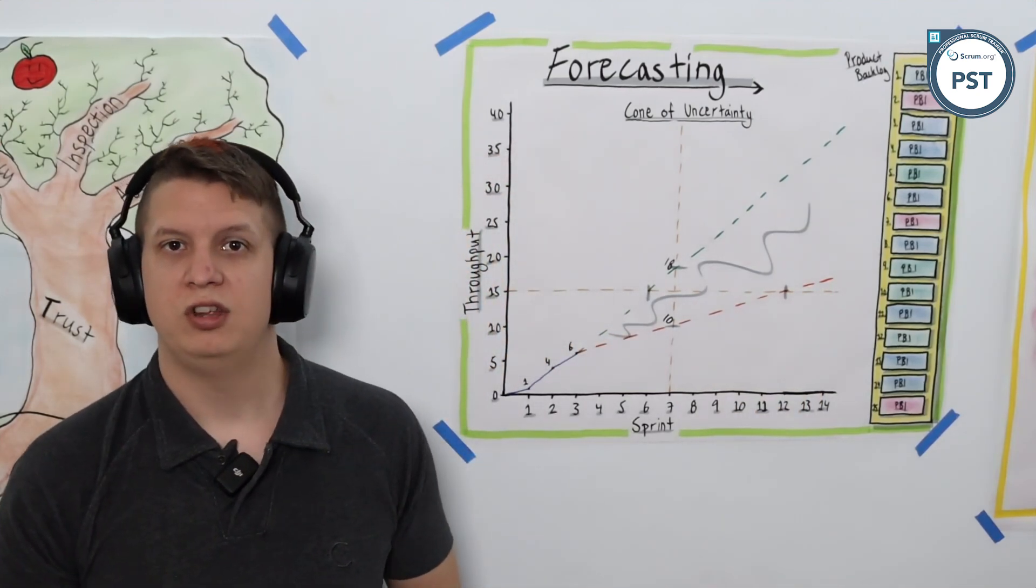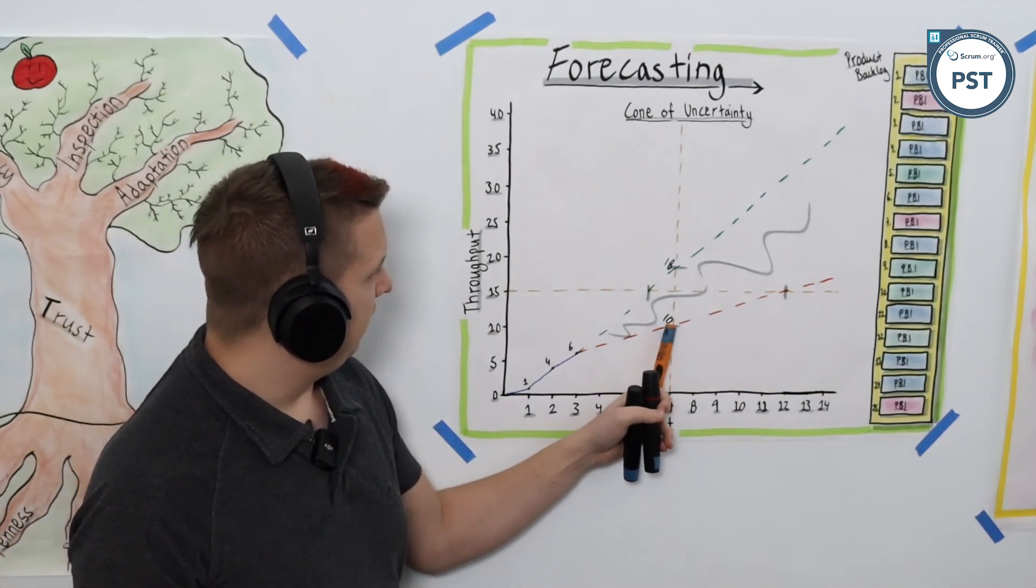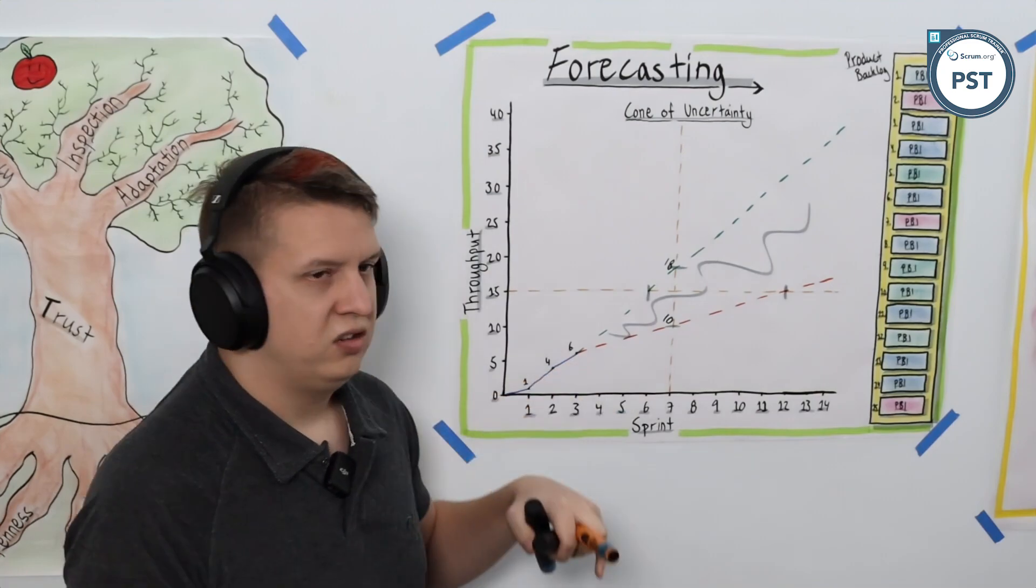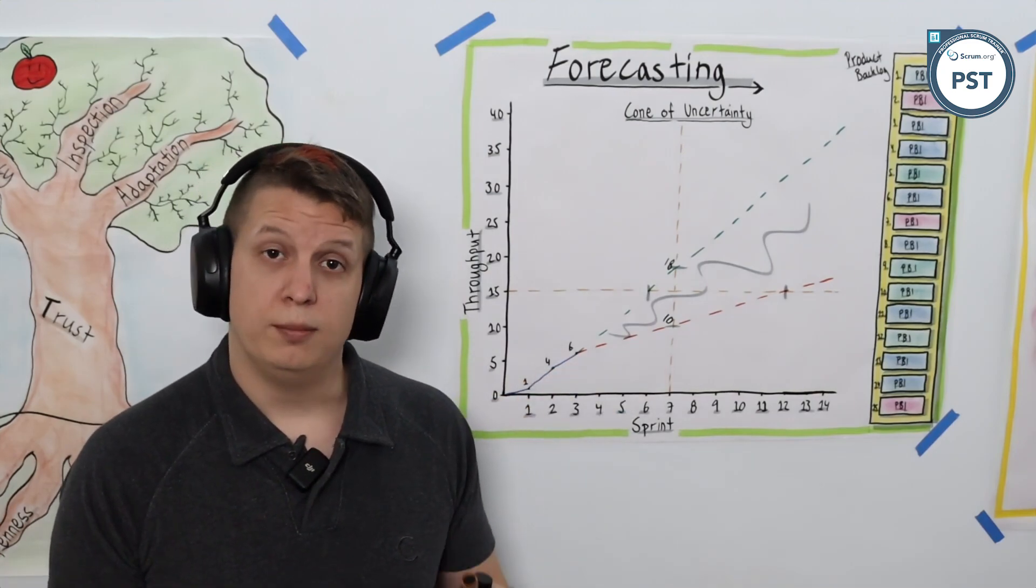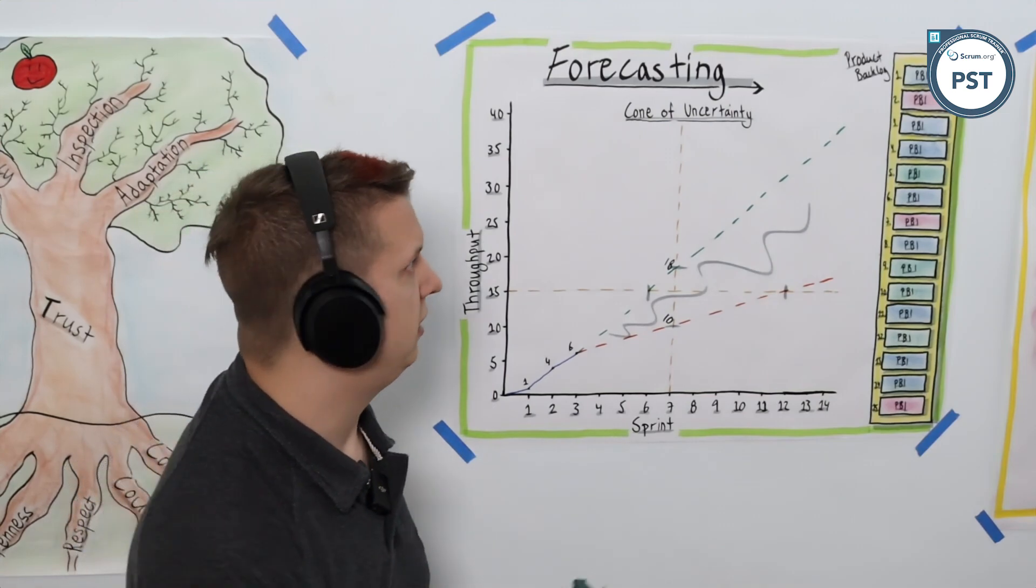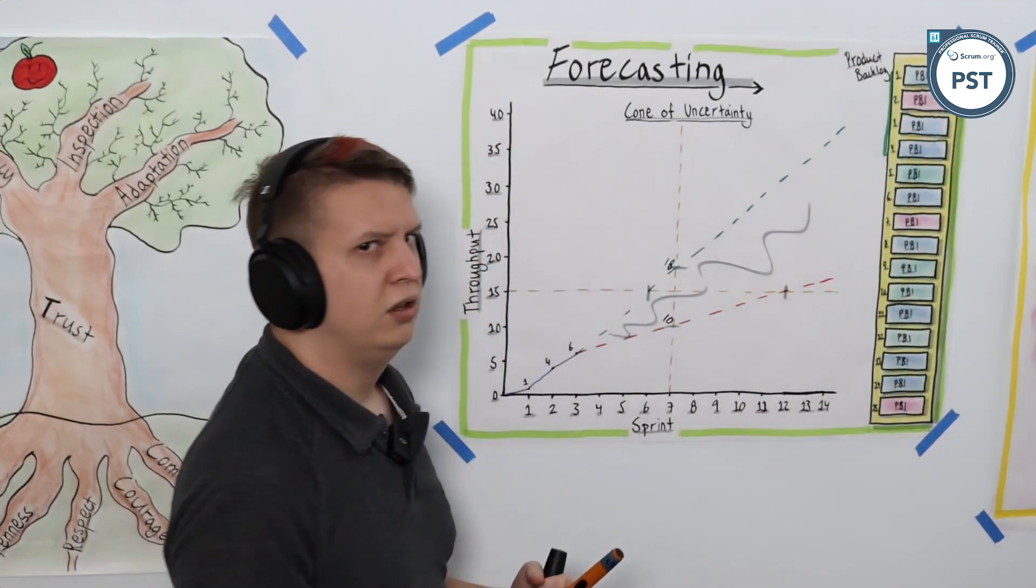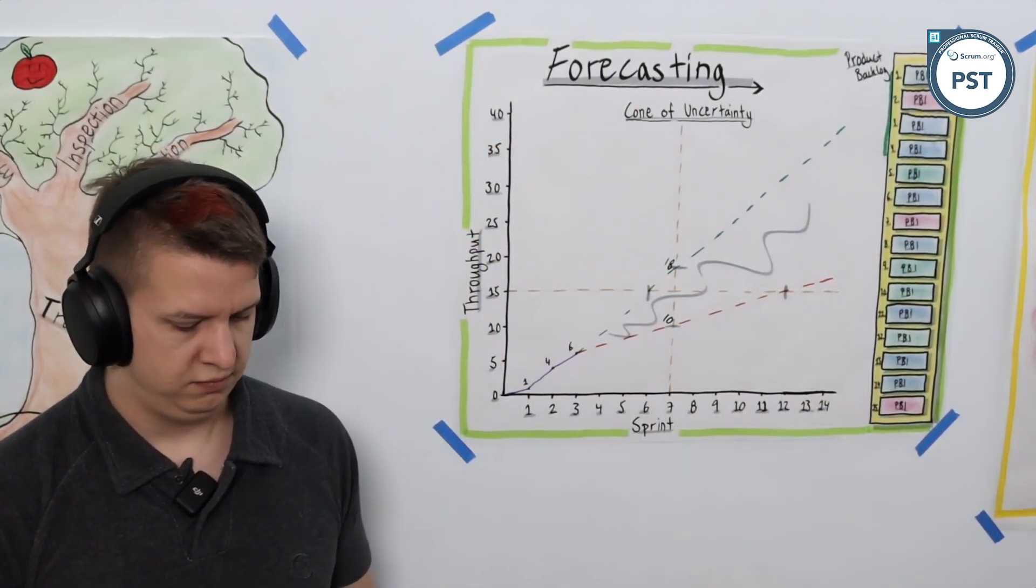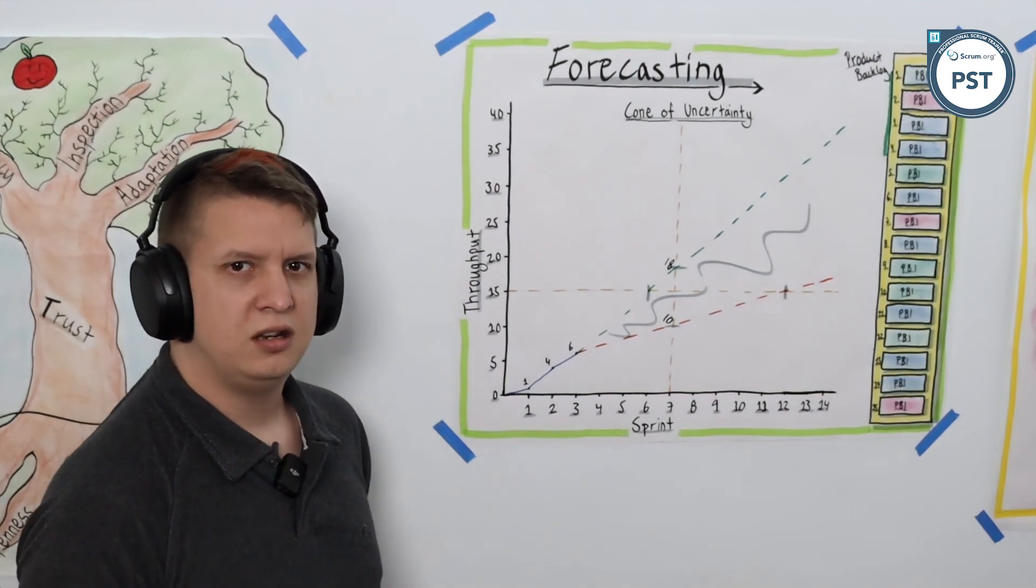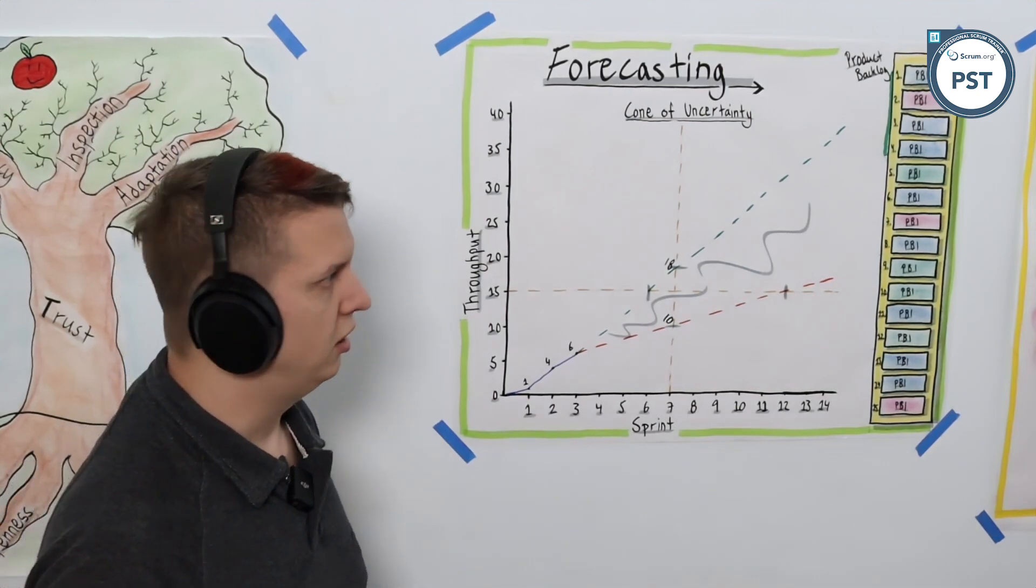Now we can have conversations about that. We can check, okay, well if we are going to get anywhere from 10 to 18 done by sprint 7 and we've got 6 done now, which 4 are the most important? Because those 4 are probably the ones we should put at the top here. The next 4, well they're less likely to get done, but they're still reasonably based on our average going to get done.